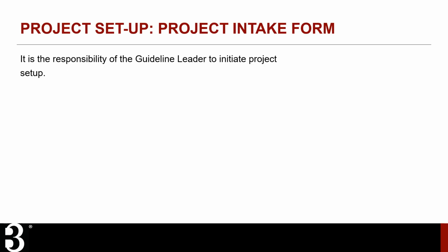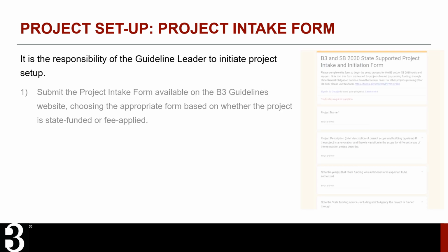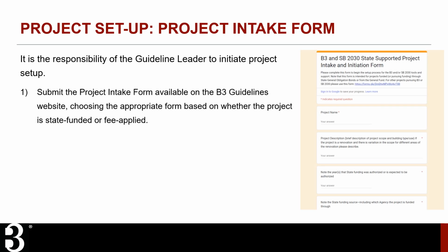Before the B3 Guidelines tracking tool can be used by the project team, it is the Guideline leader's responsibility to initiate project setup. This should be done as soon as possible. To initiate project setup, Guideline leaders should fill out the appropriate form on the B3 Guidelines website, which will depend on whether their project is state-funded or fee-applied.